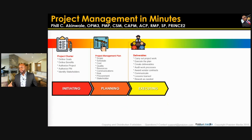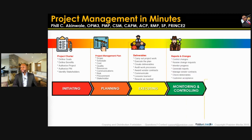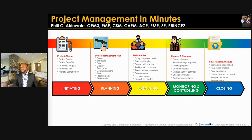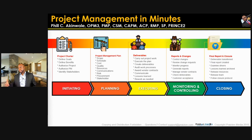You audit the work process and more. Then monitoring and controlling, where you are reporting on the project and making changes. And finally closing, where you close out either a phase or the entire project: the deliverable is transitioned, the final report is created, lessons learned are archived, and more.